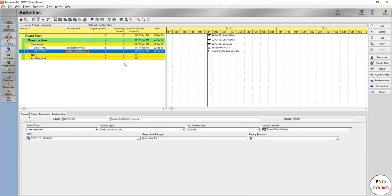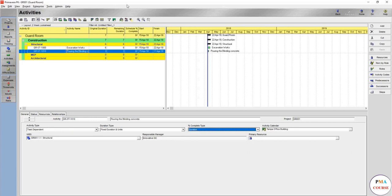There are three different ways: unit percentage complete, duration percent complete, or physical. By duration it's like it's three days. So when, let's take six days, when three days passes this means 50 percent. That's what's automatically calculated.